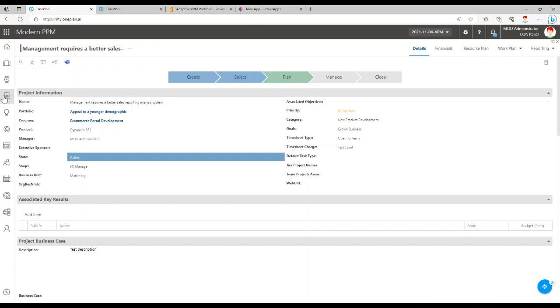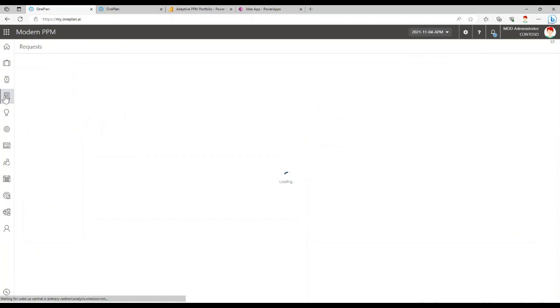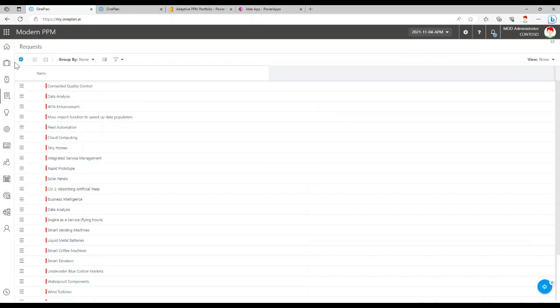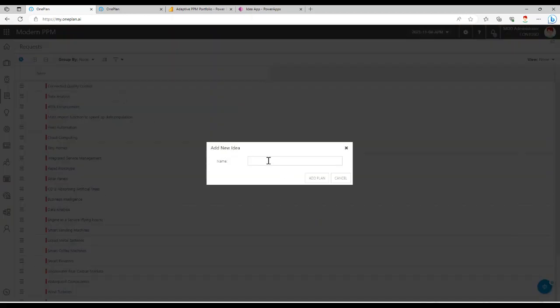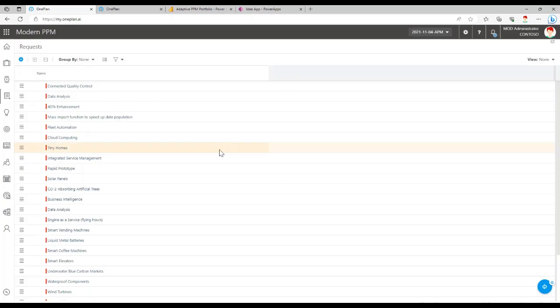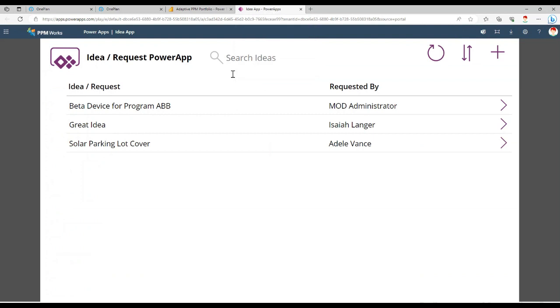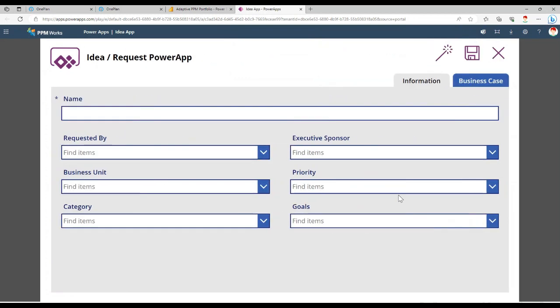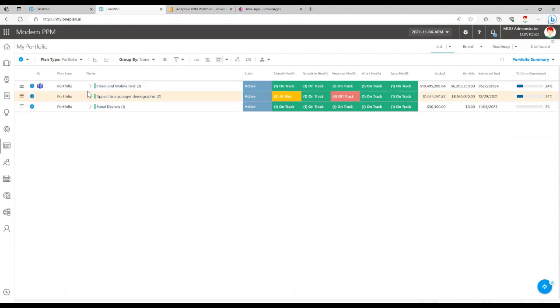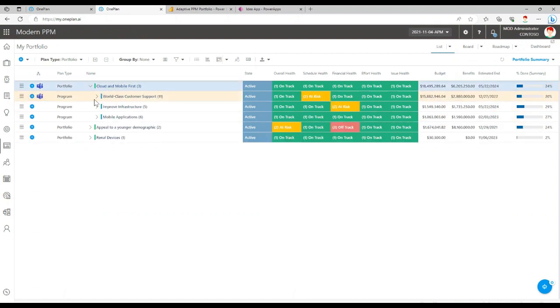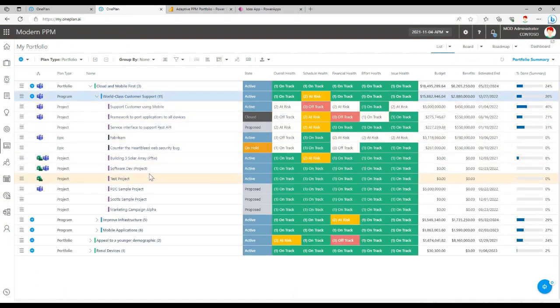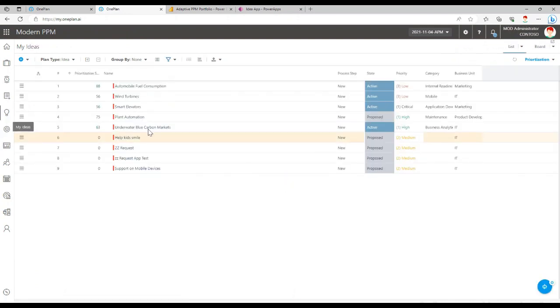Additionally, if you want folks to not initiate plans from OnePlan, you can do that. There is a request mechanism where folks can just initiate their requests here. But again, if you have a group or segment of people that are not working within OnePlan that are sort of separate from that PMO, you can have them work in Power Apps. So you could create a simple idea list Power App based on a SharePoint list and you can have them submit their requests here. Submitting the request will then initiate a Power Automate which will send those request approvals and alerts to whoever you decide. And then once that is approved, we can automate that in Power Automate to automatically create the plan in OnePlan. That can be created either as a plan or still in the idea phase.